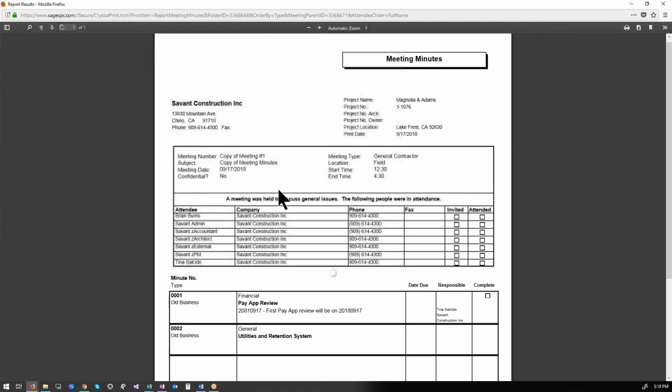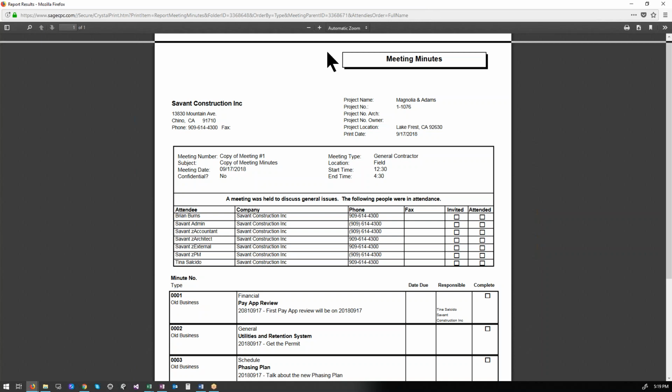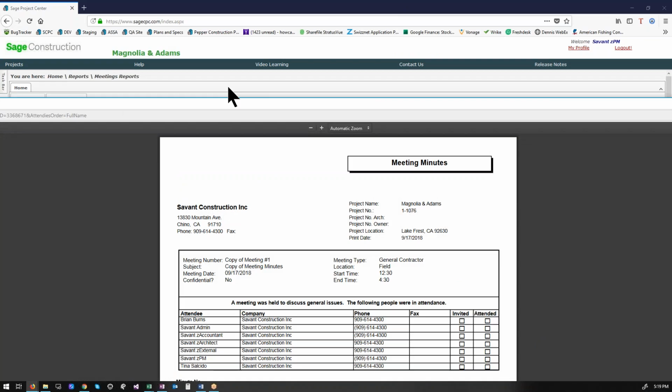I've done this before where it doesn't attach any document, it's just a transmittal. In submittals, you have to click on which attachments you want to include with the transmittal. It's just not going to take everything with it. The reason being is that the first one would be for review, and then if the architect puts something marked up, you don't want to attach both to confuse folks. Understood. All right, so that's what will be sent out on that transmittal there.